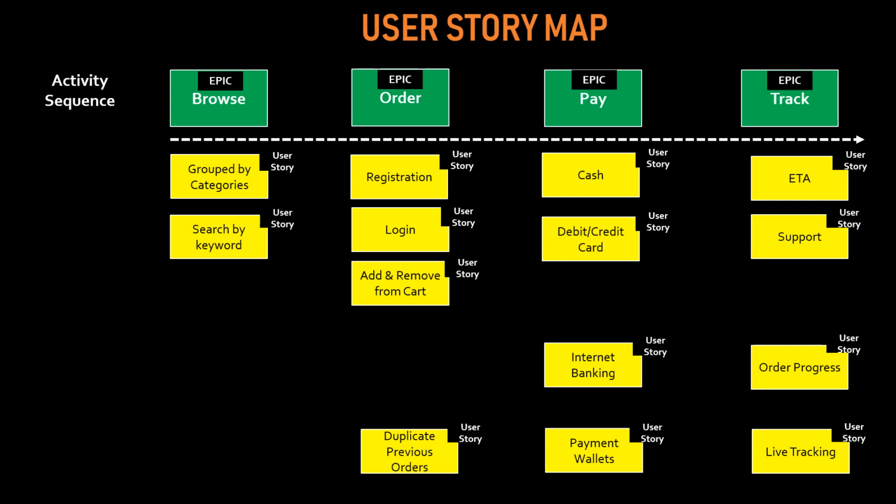Now, this is the first part. It helped you to gather the requirements and also to visualize and maintain the product backlog. The second part, which I promised earlier as a benefit, was the prioritization. This will again let you clearly see which features are key to the customer. So the MVP, or the minimum viable product, which is usually release one. There, all the business stakeholders and the product owner will be involved to understand what are those key functionalities which have to be present in the product before we let it open to the public. So that will usually be your release one.